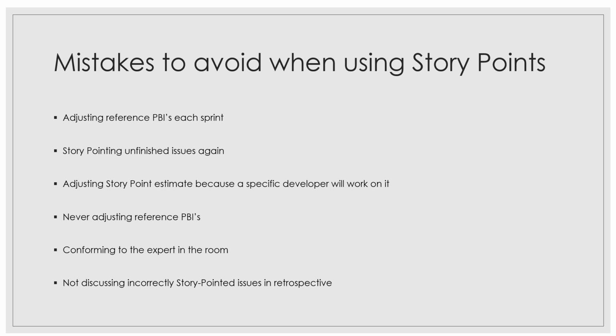So how we can avoid this situation is, one is that you can make use of an online planning poker tool, Pointing Poker. In that you can make some specific settings wherein no other team member can see the estimates of what others in the team are putting in. That's one way of doing it.